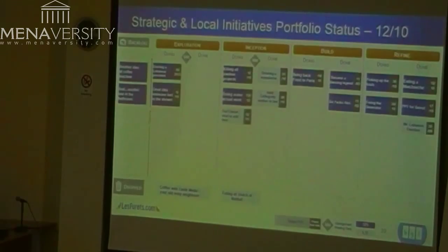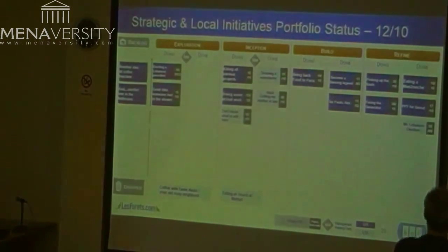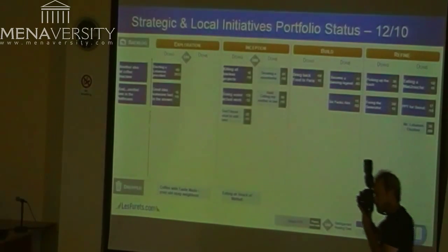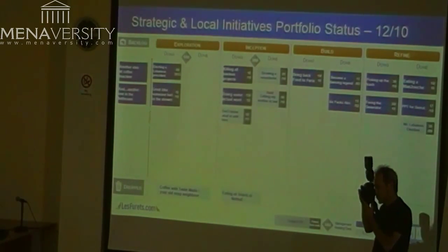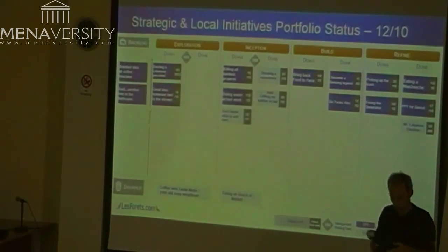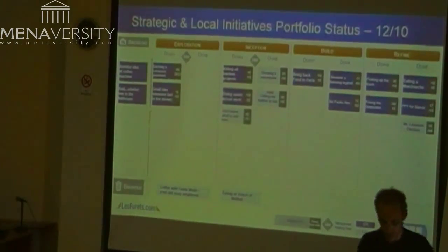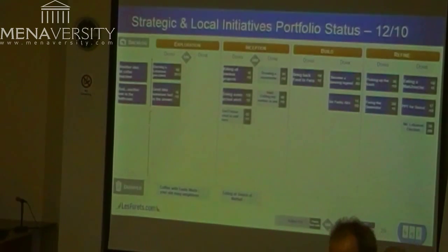Right. We don't do plannings anymore, by the way. So we don't do any more Gantt charts. Everybody's happy about it. We're not asking for time plannings from people, so that they say, okay, I think I'm going to spend 5 man days in that week and 10 man days here. We have, however, a very close follow-up on costs. So they all input the work they're doing. We need to understand how we're spending the CapEx that's allocated by the investor, of course. But we're not very pinpointy on this from the start.